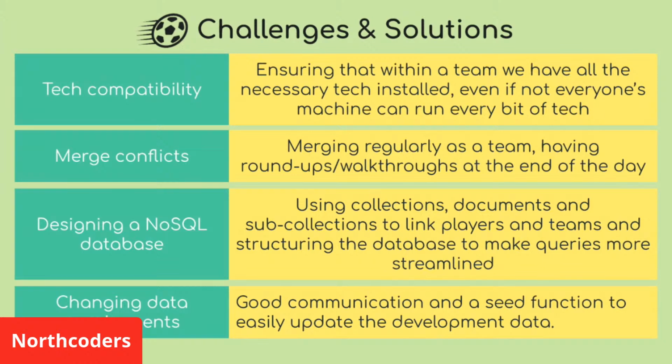With all of us working away on separate GitHub branches, merge conflicts were inevitable. We managed to get through them by merging regularly as a team and also having roundups at the end of the day, in addition to our morning stand-ups, to discuss what we've built and what might cause merge conflicts.